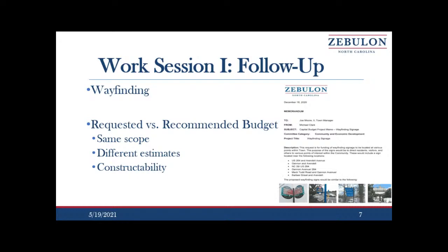That's probably a good price, especially when you look at some of the wayfinding that has been done by municipalities around us. But that's going to be representative of a sign like that. It's not going to be adequate to reflect the cost for the interchange wayfinding signs that is proposed in here. Based on my experience, those could range from anywhere between $10,000 and $12,000 a piece. And if you do 2 at each interchange, actually the budget is not going to be enough to fund that. So I just want to be real clear that the scope is the same. It's just that the estimate was bumped up because those interchange signs, if you choose to do it, are much more expensive.